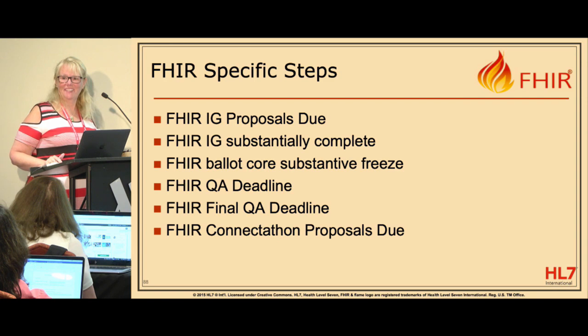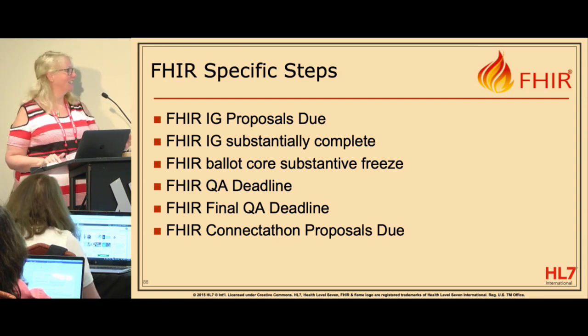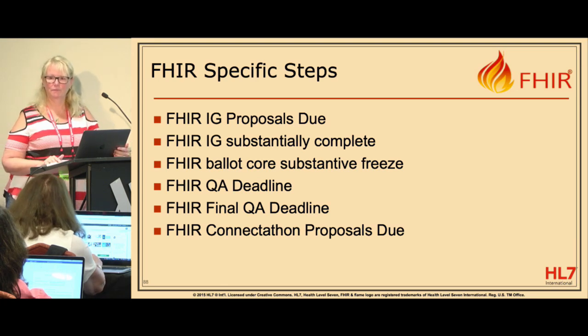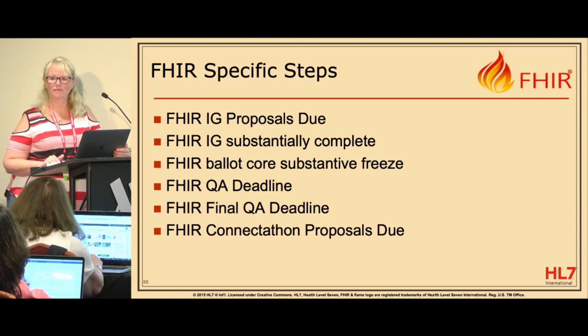That's mostly right. The purpose of the substantively complete deadline is we have had a history of 2 or 3 days before the final content is due for a ballot of people putting stuff into their specification that's new and cool and interesting and totally breaks the publication tools.